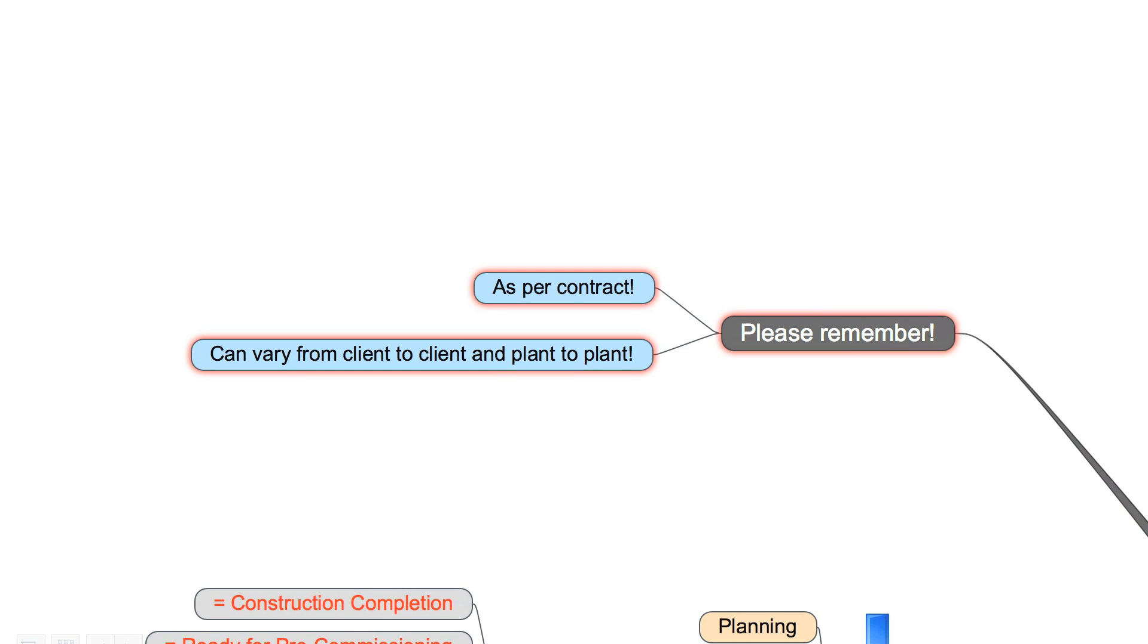So again, please remember mechanical completion is only defined per contract. You have to check, you have to read the contract and understand it. This is the only right answer, the contract. And it can vary from client to client and as well from plant to plant.